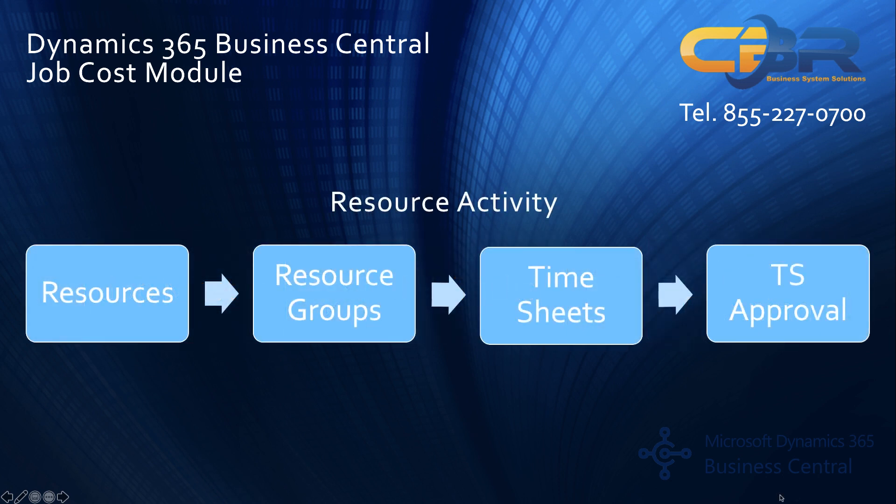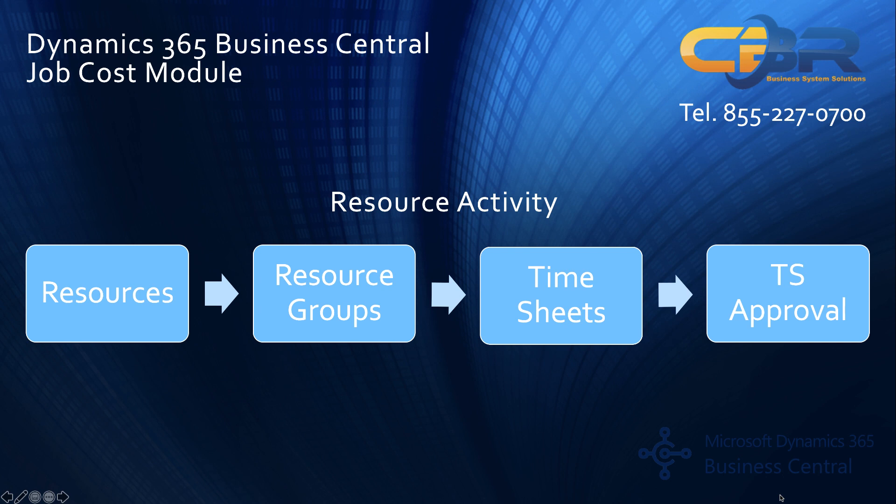Resource activity tracking is of course a primary function of any job costing module and in the Microsoft world these resources can be human beings as well as special equipment that may be needed to perform or work on a job. These resources can then in turn also be grouped together and on the planning or scheduling perspective can be treated as a group instead of an individual resource.